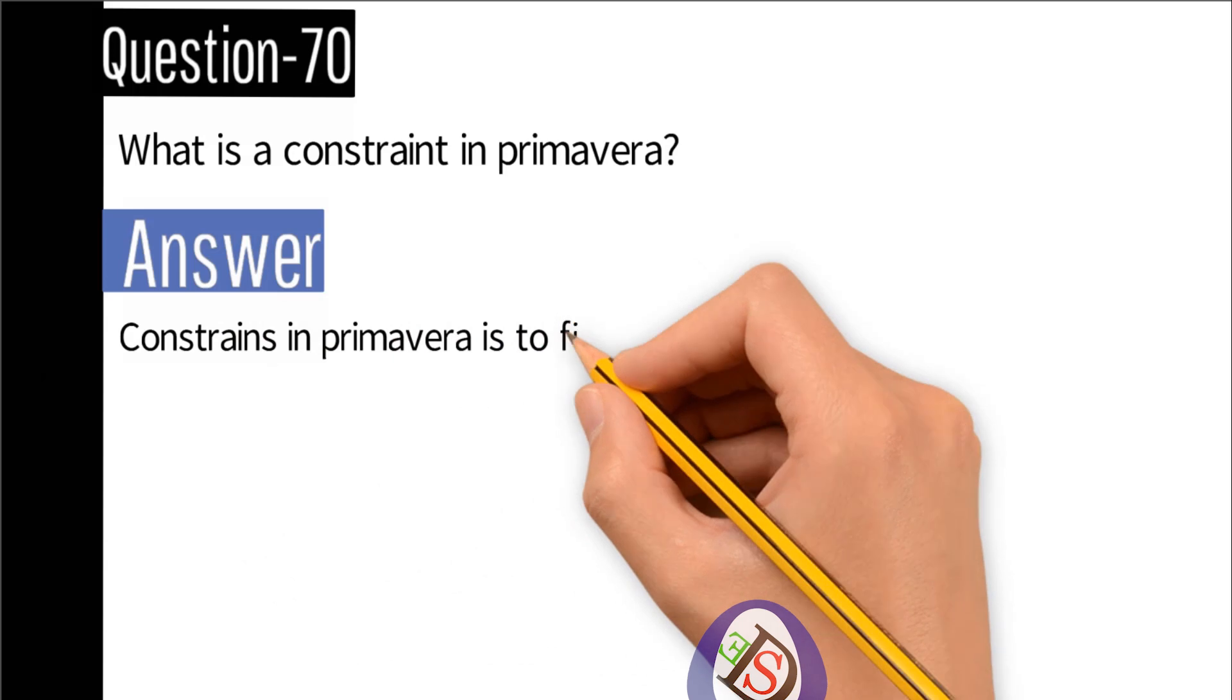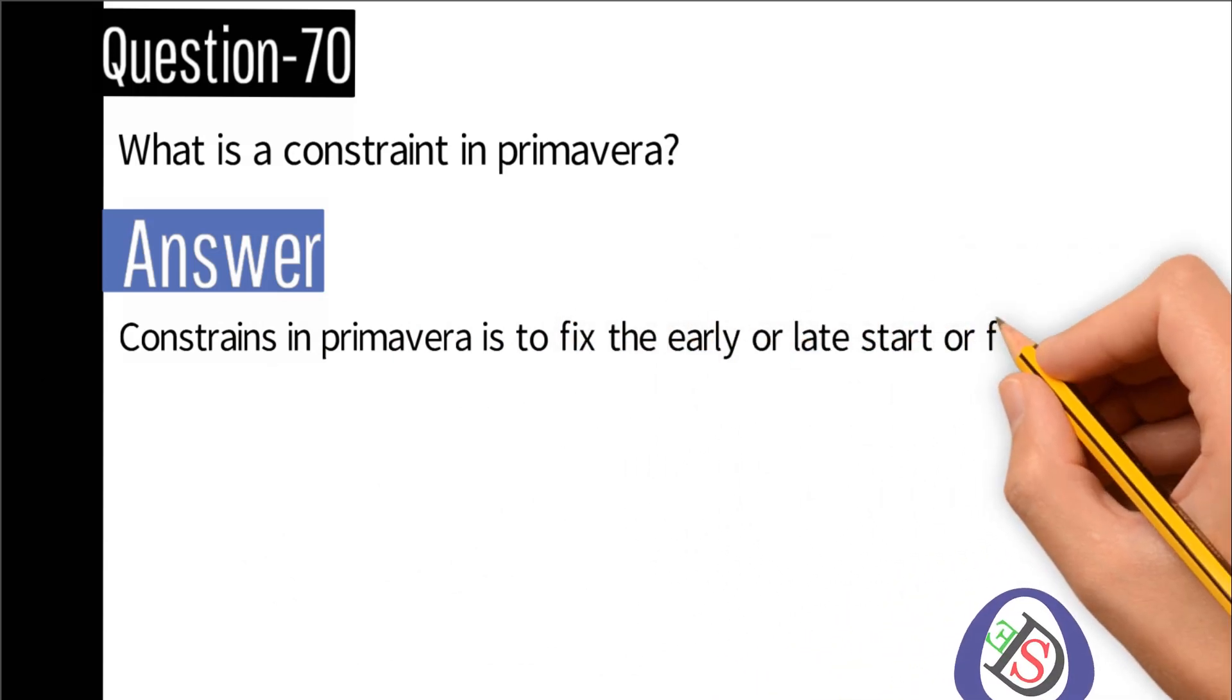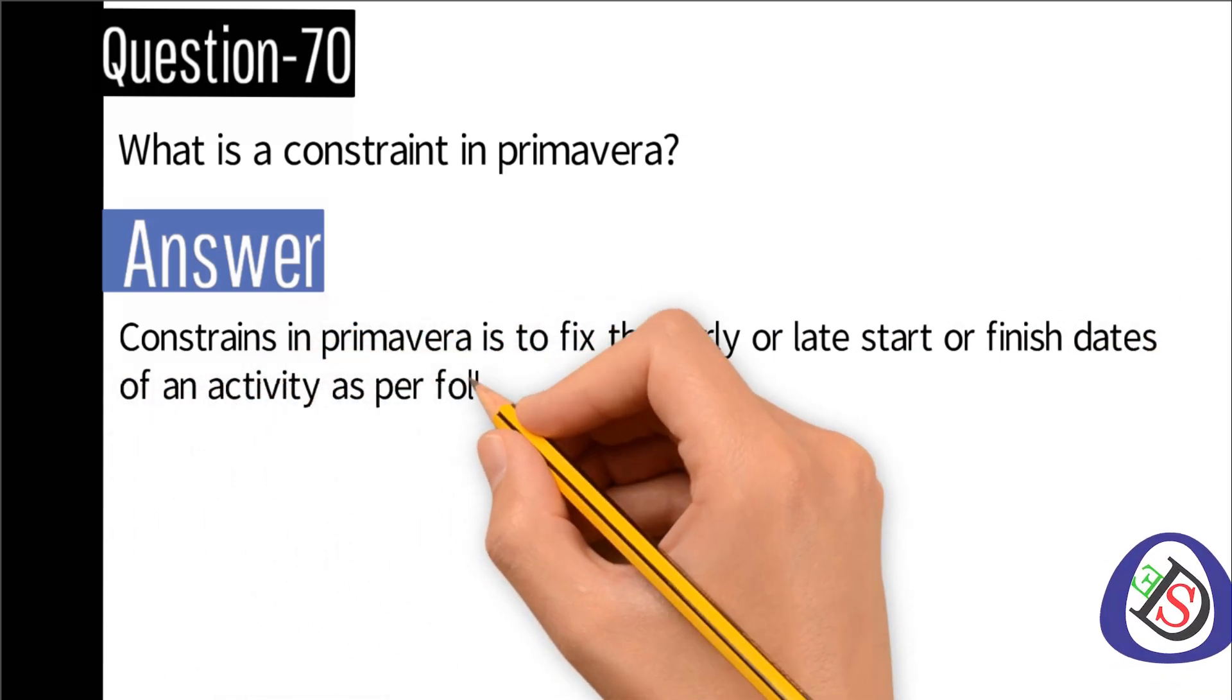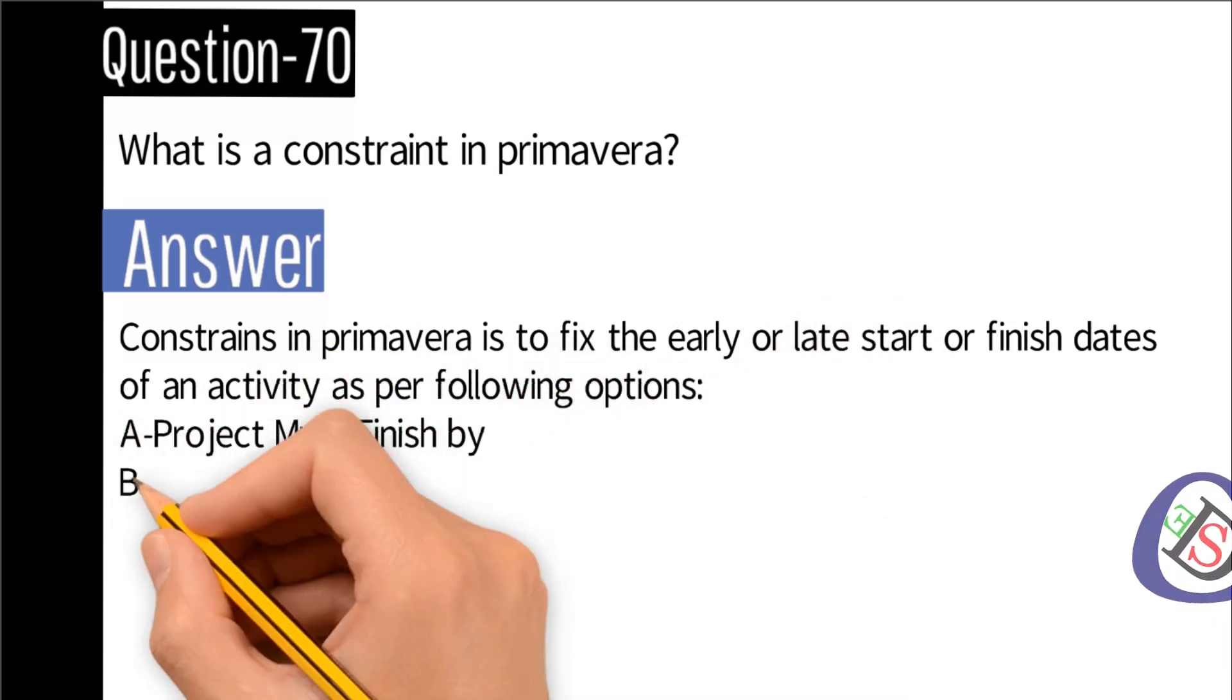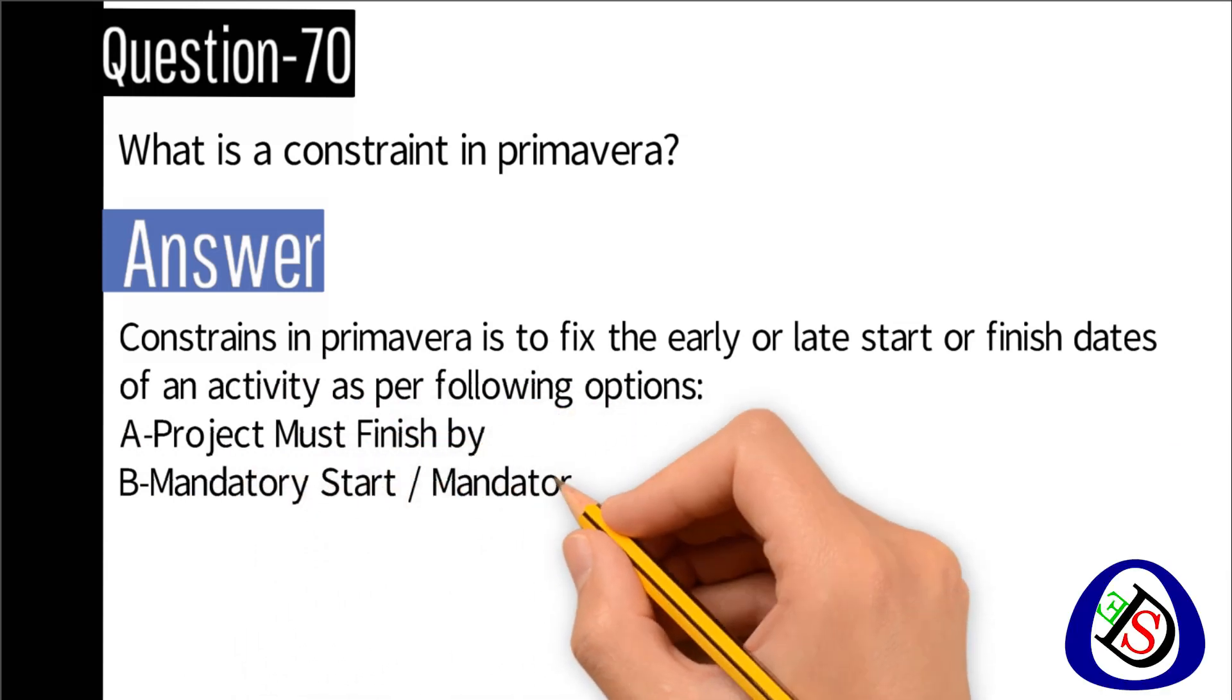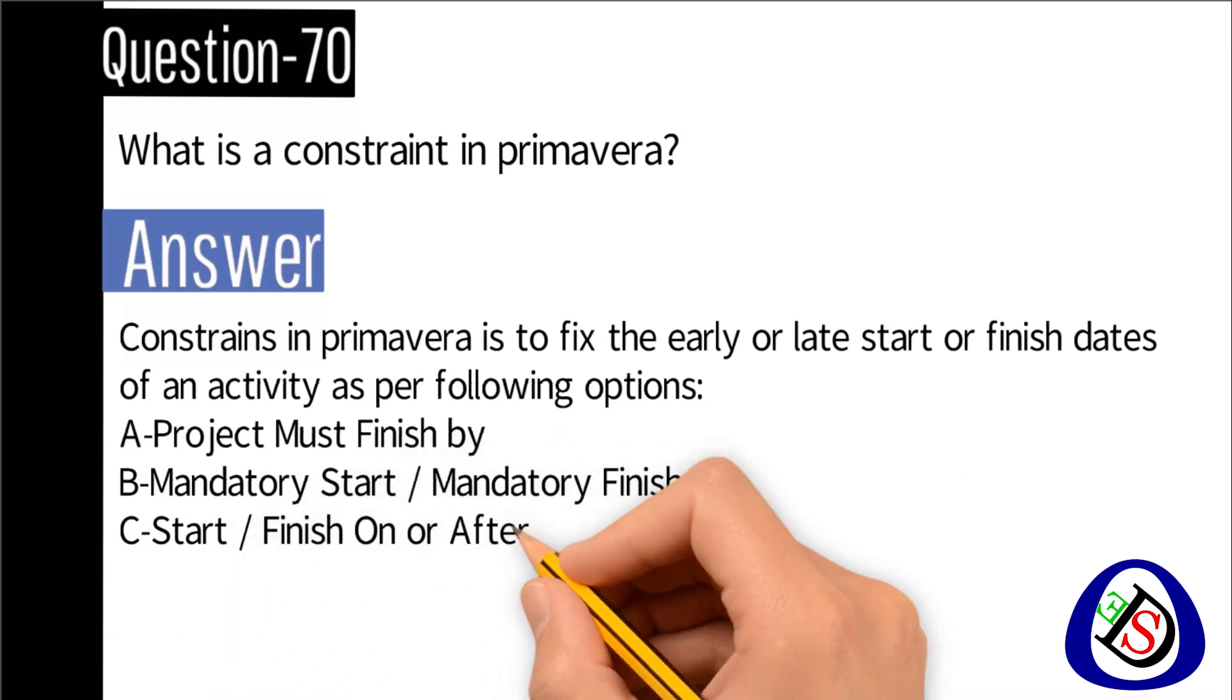Question number 70: What is a constraint in Primavera? Answer: Constraints in Primavera is to fix the early or late start or finish dates of an activity as per following options. A project must finish by.